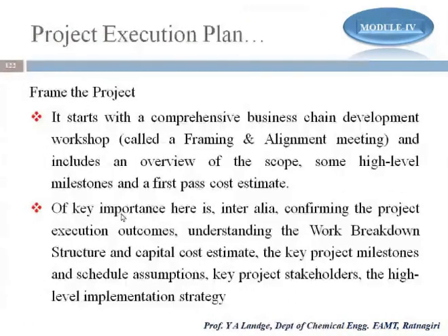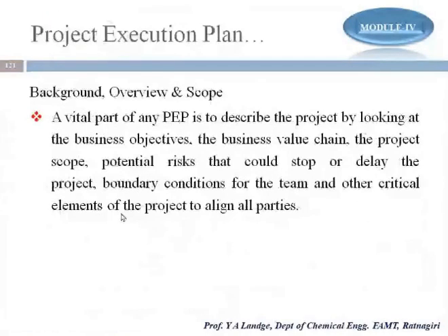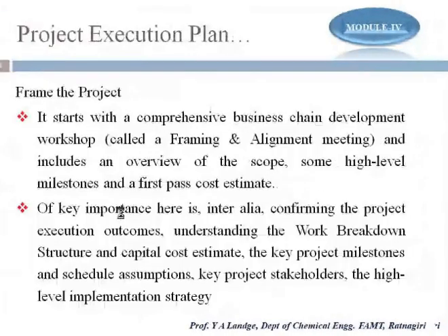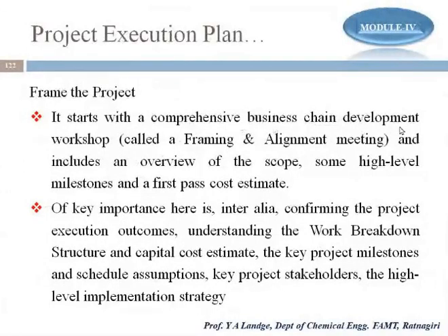So the frame of the project, how can we frame it? It starts with a comprehensive business chain development workshop called the framing and alignment meeting, and includes an overview of the scope, some high level milestones, and a first pass cost estimate. Now, what is the content in framing the project? Here we have the comprehensive business chain development workshops. Obviously there are brainstorming sessions and meetings where we are structuring the project, and we are looking at the overview of the scope.